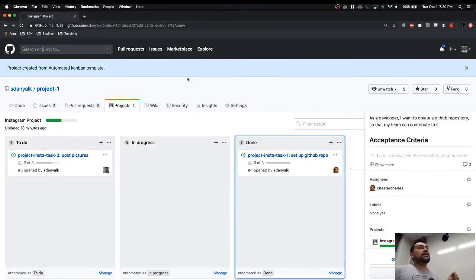It happens between 8, 8:30, 9, 9:30, doesn't matter. As a team, you decide a time. Could be in the evening, doesn't matter. At my company, we have our meetings at 9 o'clock, and it goes until a hard stop at 9:15. Stand-ups are supposed to be 15 minutes and not longer than that. If it goes longer, then you're missing the point.